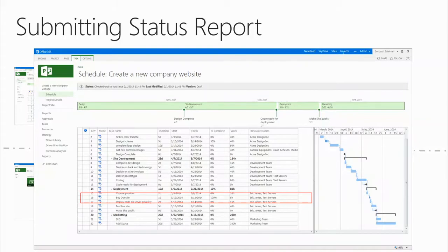So it's basically, for this, you don't need to have any sort of client at all, so everything is done in the web. And the difference between the new release and the old release is that the scheduling engine from the client is now on the server. Before, there were two separate scheduling engines, and in some cases you could get different results. The new server doesn't do that. It's the same scheduling, whether you open it in a client or on a server. So it eliminates a little bit more of the need of having a separate client for PMs having to open stuff in the desktop client to approve and reject stuff.